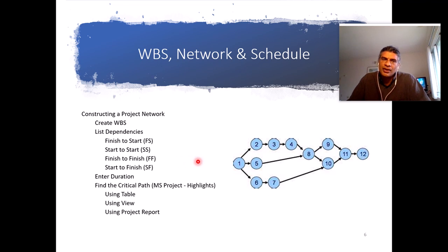Sometimes if I finish a task and start another one, it is called finish to start. For example, I have to pack my stuff before I go for a trip, or I have to buy the ticket before I go for the trip. I have to get into the car before I drive. So it's like logical dependencies, which means a task has to finish before we start another one. That is called finish start.